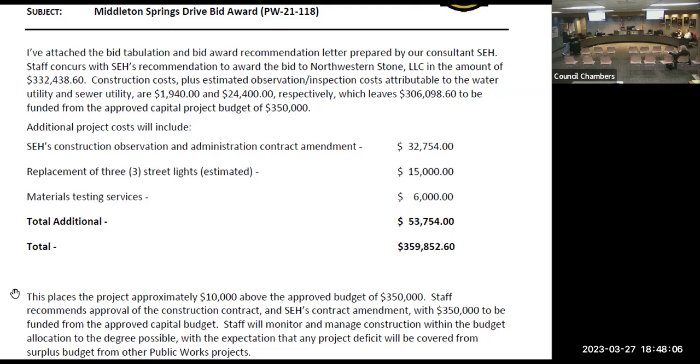Yeah. We do have a different line item coming up later that looks like bids came in below our budget number. So I think on balance, we're in pretty good shape. This one's a little bit over, but the recommendation includes, of course, monitoring it and seeing where we actually end up. Some of these numbers are estimates, and even some of the bid quantities undercut our estimates. So this could get worse, but it could get better. So bottom line is, I think we're very close to our budget number, and I think we should proceed. We're recommending approval of that contract.